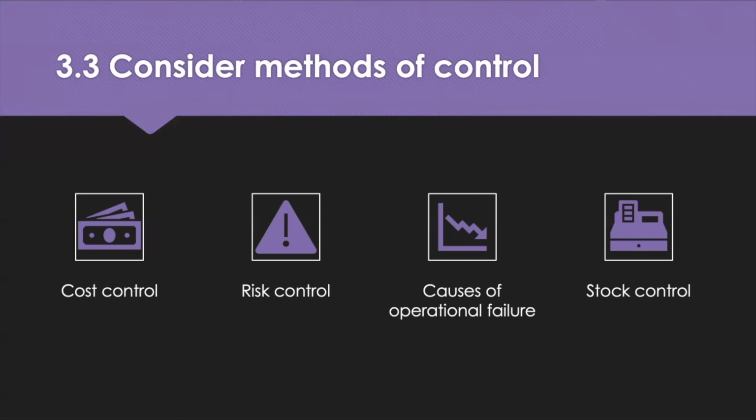So cost control, internally, costs are often controlled by monitoring budgets. Cost codes are frequently used to enable detailed analysis of the types of cost. And only authorised staff are permitted to authorise specific cost codes. And ultimately, payments from bank accounts can be authorised by specific officials. Now, your costs can be examined frequently to ensure that they are in budget. And budget reports are often created nowadays by accounting systems which highlight any under or over budget situations. This type of variance analysis is a common technique used to control the situation.